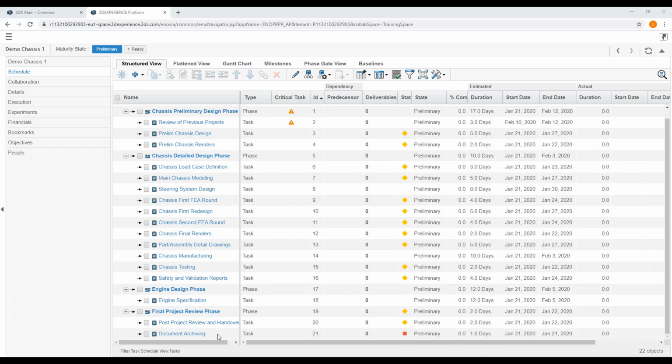All of these tasks were created with the scheduling constraint of as soon as possible, and therefore their current start dates are defined as the 21st of Jan for all of them. This is obviously unrealistic, and we will fix this by including the dependencies for the tasks.